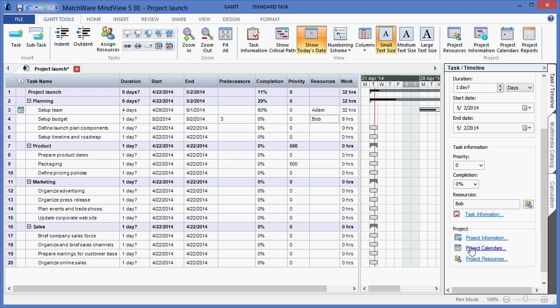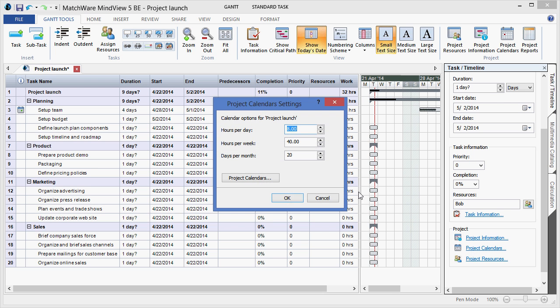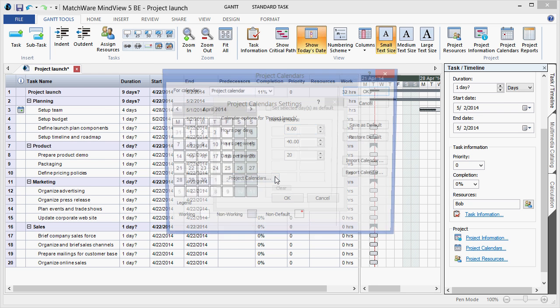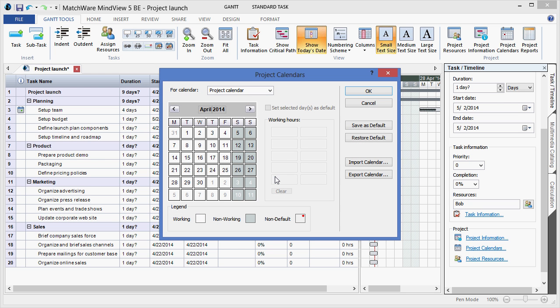I can affect the project calendar, which allows me to define what one day equals within the project plan. I can locate the project calendars to define specific working hours on various days, if there happens to be a holiday or a non-working hour.